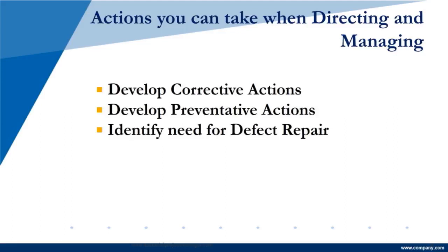You can develop preventive actions. You know, if you see things that could go wrong, anything from as you're having your meetings or you're talking to people, you can see that perhaps there's a holiday coming up that a lot of people are going to be missing, or it's about the end of school for some folks, or maybe there's a religious holiday of some of your staff that are overseas that you know about, and preventative actions can be as easy as just trying to make sure everybody's aware and everybody is informed and you have coverage during the times that you need it.